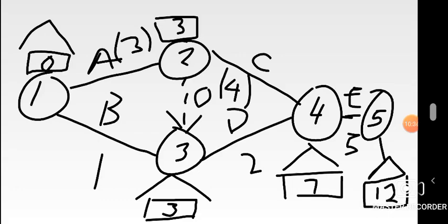After this, what do you do next? Start going in reverse now. You're now going to start with a new criterion of latest completion time. The latest completion time should always start from the last node, which in this case is 5. So you find that, okay, you're on the last node, 5. What would be the latest completion time? Well, again, there's nothing else going out from 5. It's the last point.